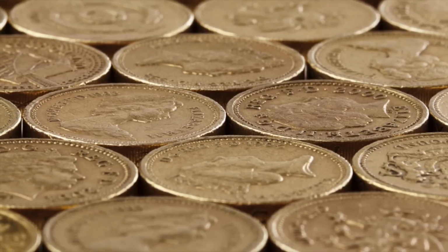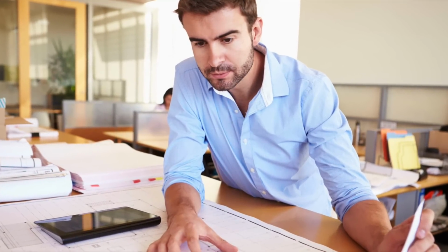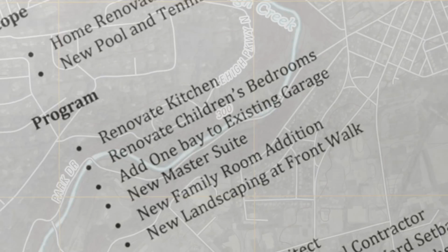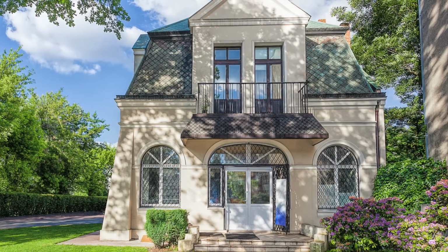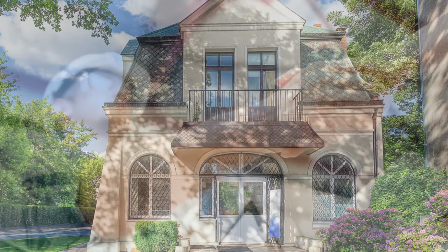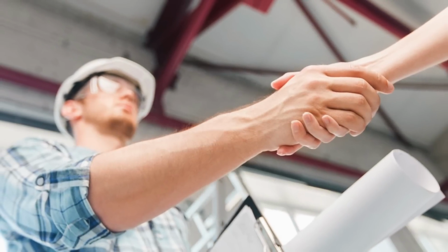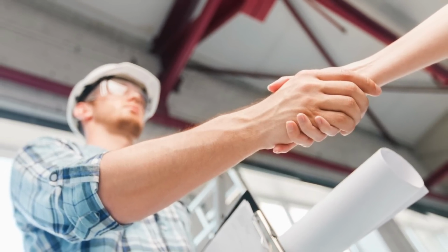Include a budget that's consistent with these project goals and is developed with the architect's input. Your contract should list the owner's responsibilities, such as developing a program, furnishing a survey, providing information about existing conditions, and even providing other professional services like engineering or landscaping.